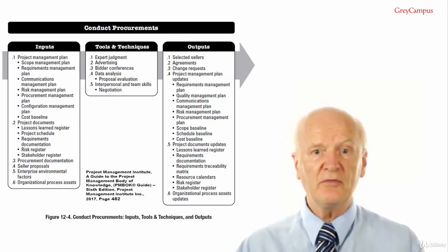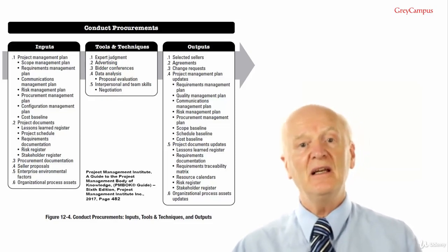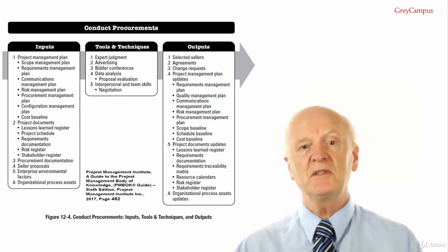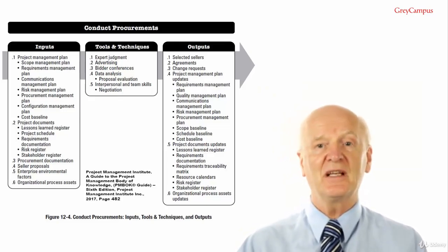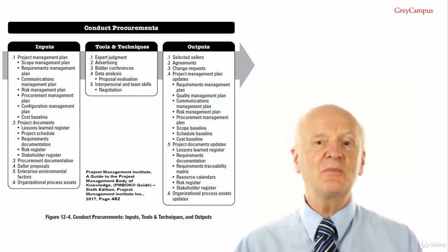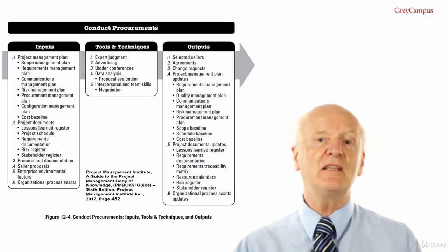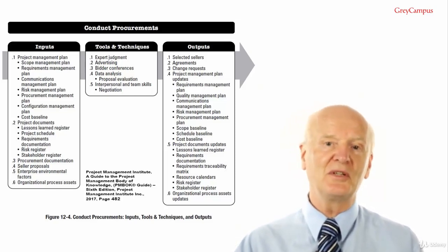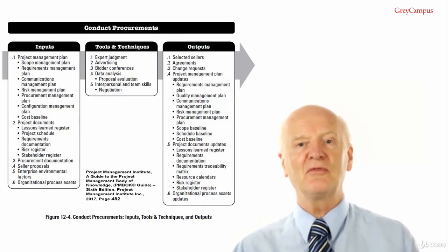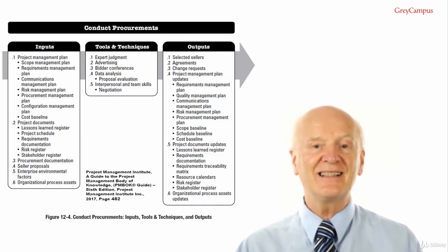Some will respond for various reasons. At least one will try to get you to take a different product from the one you want. Software developers in particular do this. You send out a detailed requirement for a payroll system, and they'll respond that they have maybe an invoicing system that they claim will do 95% of what you want, and they agree to modify it for the remaining 5%. If someone offers you a deal like this, run away quickly.